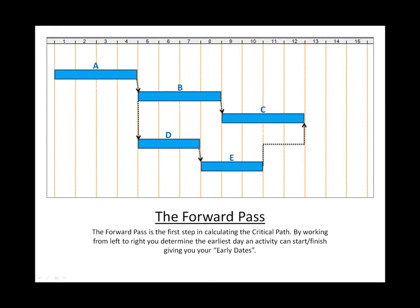Okay, now for the fun part, the CPM calculation. First you do what is called a forward pass. By working from left to right, you determine the earliest day an activity can start and finish, giving you what are called early dates. Let's do it.